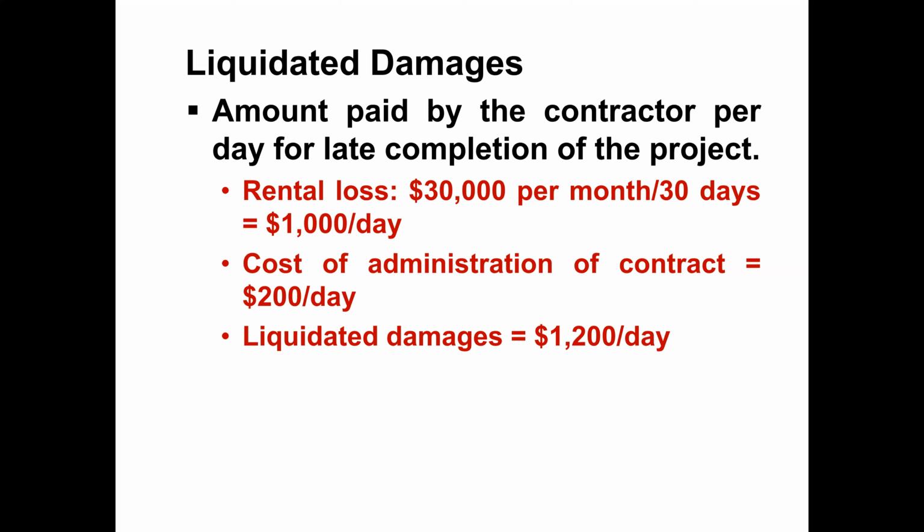Okay, so let's take an example. Suppose there are a couple of small shops. Rental loss is 30,000 per month, so the per day loss, divided by 30, is 1,000 per day. Cost of administration is 200 per day. So liquidity damages become 1,200.